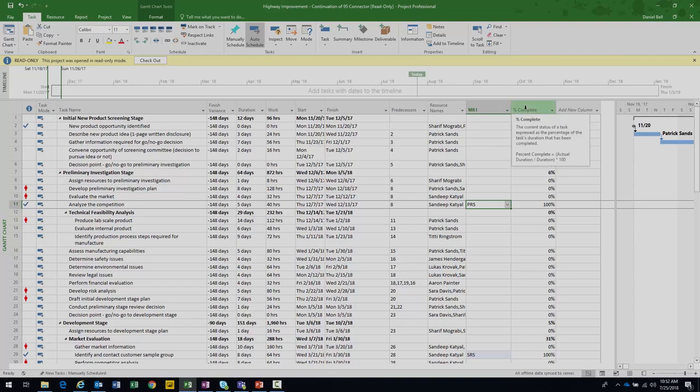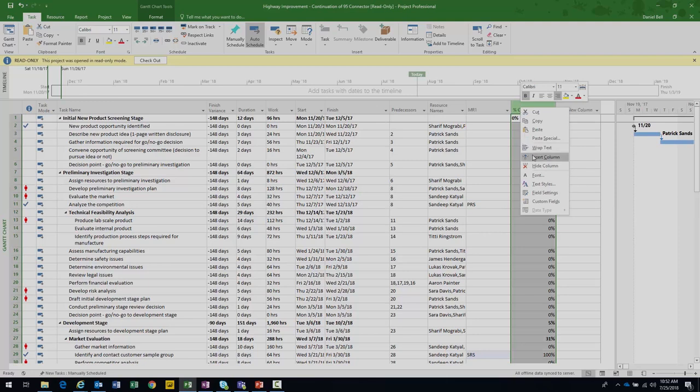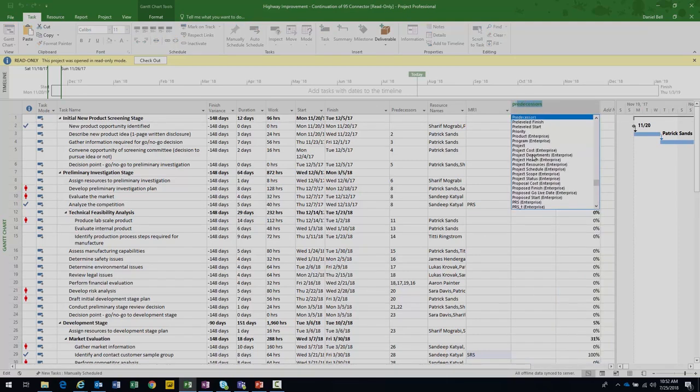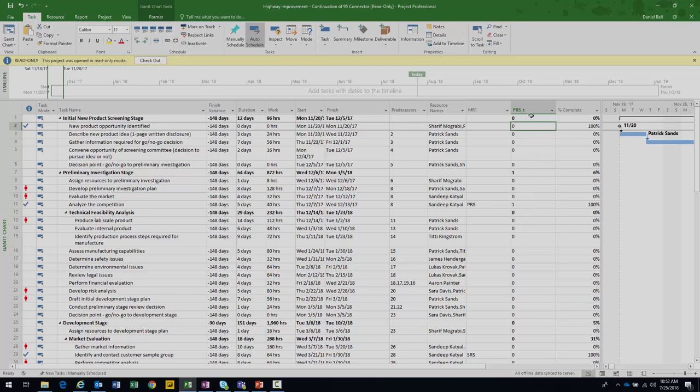First of all, since it's a task level field, you need to have a task level formula to evaluate what's going on here. So there's going to be a task level field, and if I right click here and say insert and type PR, it's going to bring me to the fields that begin with PR. And notice there are 2 PRS fields. One has an underscore T appended to the end of it. One does not. The underscore T just represents that it's a task level field. It just makes it easier for me or whoever's maintaining the system to be able to find it. Click on that one, bring it up. And notice it's just going to be numbers here. We'll talk a little bit about that later. In this case, notice it has a value of 1 for the PRS task right here.